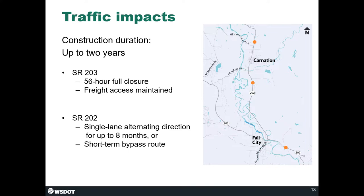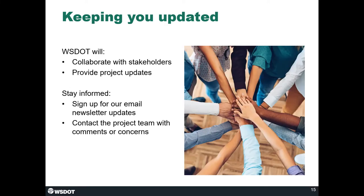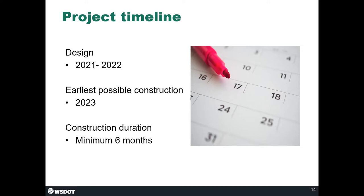On SR202 at Skunk Creek, there are a couple of potential options. The work could be completed by reducing SR202 to alternating single-lane traffic for up to eight months, or the design-builder could look into building a short-term bypass route using Southeast Fish Hatchery Road. Starting in 2023 at the earliest, this project is combined into one design-build contract with fish passage projects on I-90 near Bellevue and SR161 near Federal Way, so the construction window is quite lengthy.